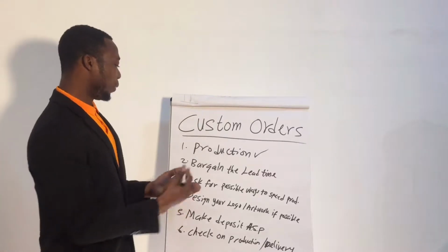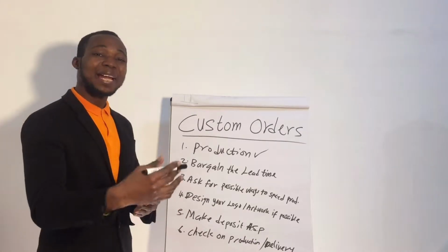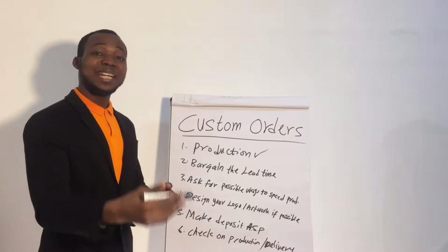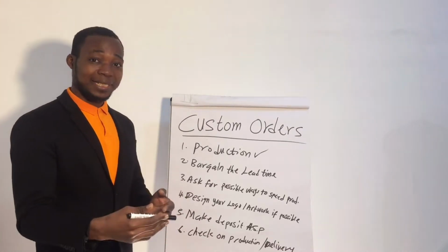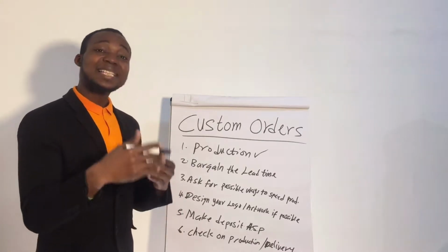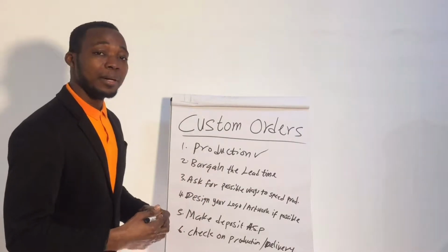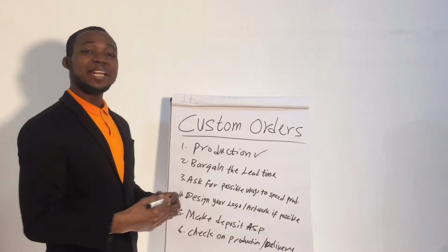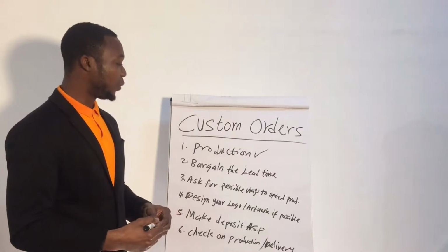Why do you need to know this production factor? You want to know this so that you can plan your production in advance, so that you can source your souvenirs, your promotional items, your gift items, or your company attire or uniforms in advance, so that you don't wait for the last 10 days before you contact a factory or a printing company to request for your t-shirts, and they tell you they can use 15 days and you are locked up, or you don't know what to do.